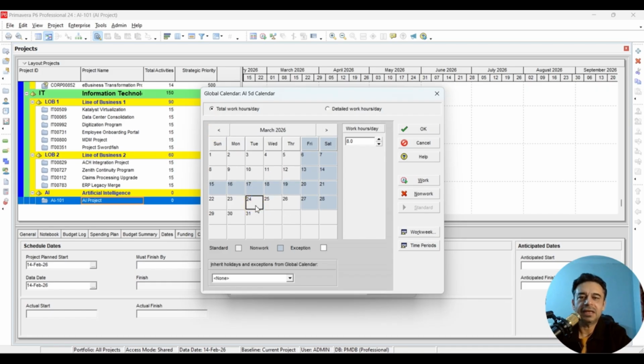So you can do the same thing in December for Christmas, for New Year, or like Eid holidays during the month of Ramadan, and it depends. So if you want to change the standard 8 hours per day to some other duration for any specific day or week, what you can do, you can again select those days. So I'm going to select this whole week from 12th till 16th. And all you need to do is to change the number of hours. So let's say I'll put here 12. So here we have that from 12 till 16th, these are all 12 hours per day. All right. And for all the others, it is all the standard time.